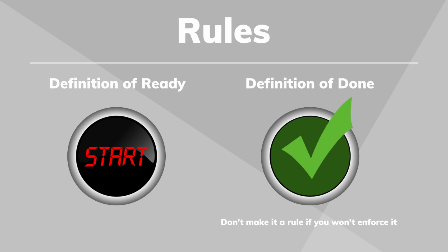These are rules. These basically say we're not going to go any further until this is ready. And that way, as a team, we can review that. Have we met the definition of done? No, we haven't. There's high priority defects. Okay, when are those defects going to get fixed? Where are they in the schedule? We can't have just shoved them into the backlog. We need to make sure that those are actually scheduled to be fixed. And then we can look at when this story might be complete. Otherwise, you can end up with a whole bunch of stories that are that old 90% done, but not done. Therefore, we can't really go on. We can't really accept that they're ready to go.